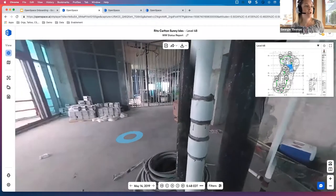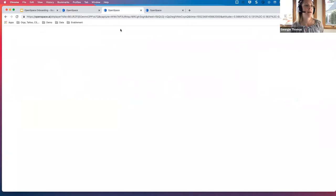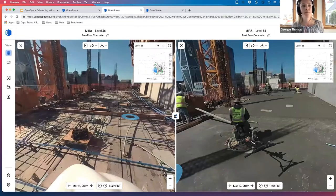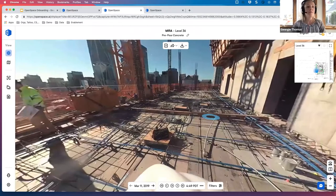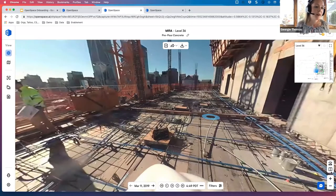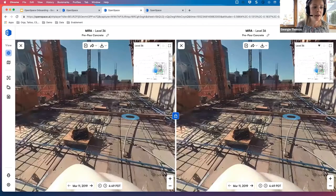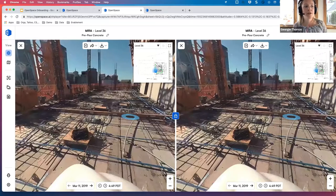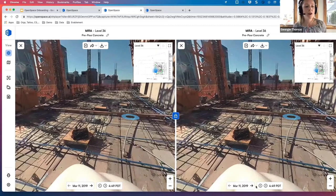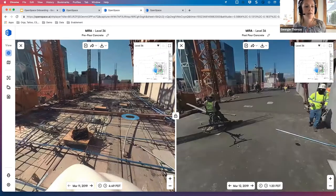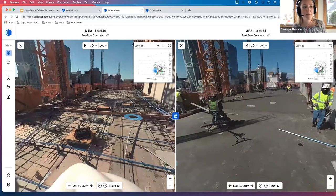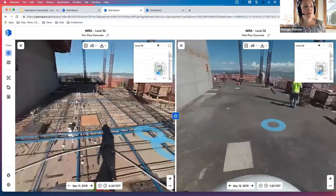So that's navigation. We're now going to jump into a new demo site. I'm going to talk through one of my favorite features, split view. So I'll show you how I got to this view right here. I'm going to X out right above the zoom in button on the bottom right hand corner. It kind of looks like a book or a window. It says split view. If I click on this button, our view is cut in half. So I can change the date on either the left or right hand side. If I go to the next day on the right, I can see that the concrete was poured.